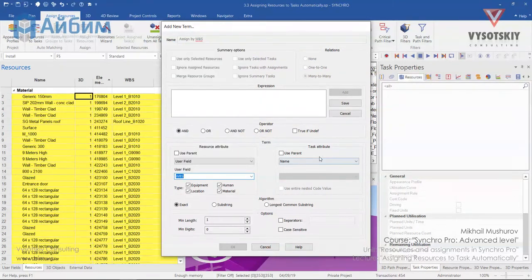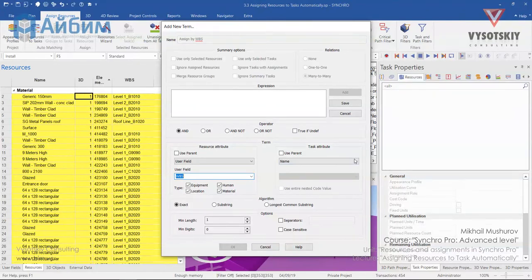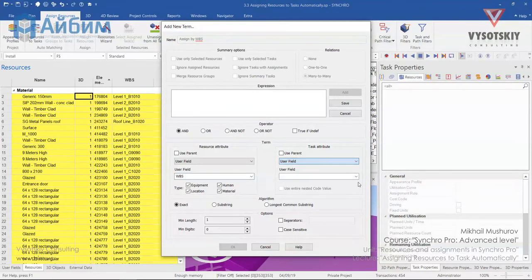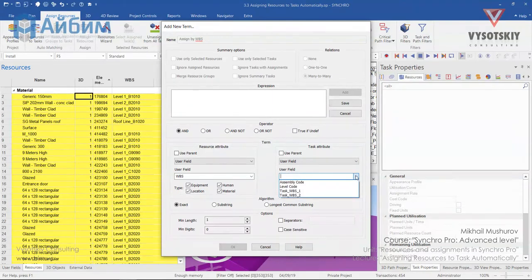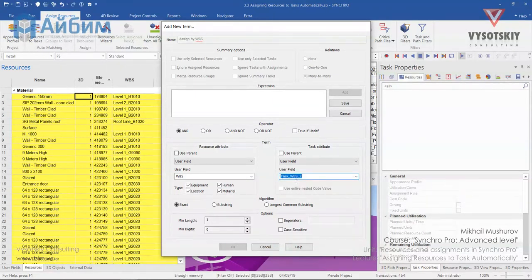For a task, we also were using User field and its name is TaskVBS2, the calculated User field. So click over User field and select TaskVBS2. That's it for our Find expression.